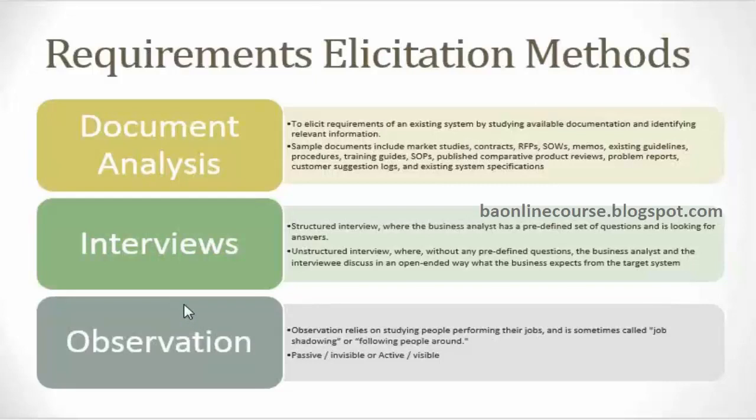Right. So I think broadly you're aware of the topic, but work on the articulation. It's not just knowing the topic, but answering it as well. The change request comes in, then you analyze it, then you send it to the senior management, your change control board, for authorization. They would decide what to do, and then you would pass it.